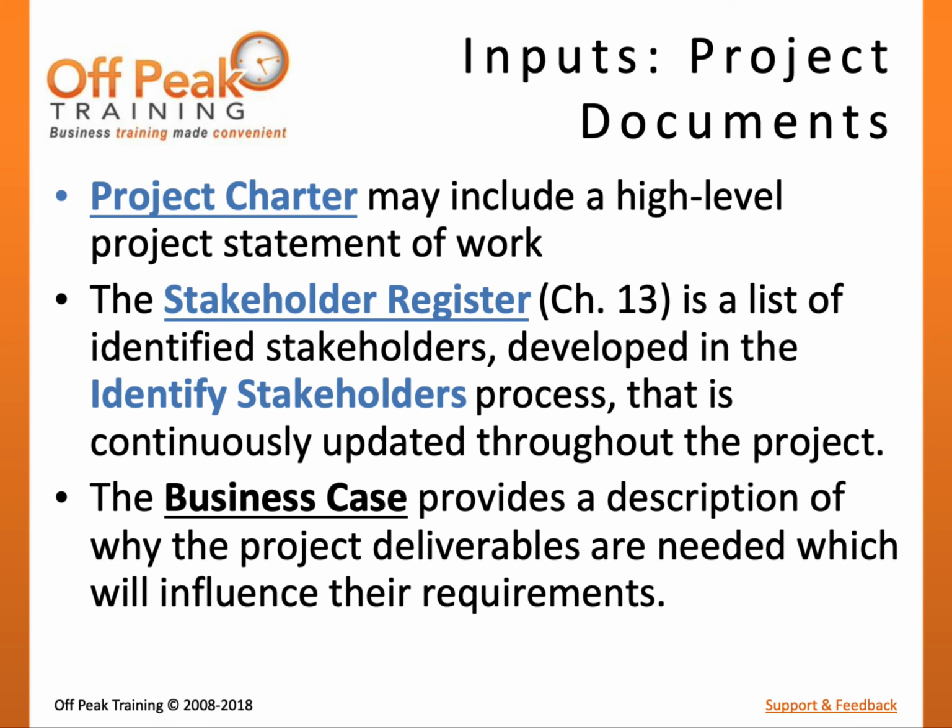The PMBOK guide also lists 3 project documents as inputs to the Collect Requirements process. The project charter may provide high-level requirements and desired product characteristics as determined during project initiation. The Stakeholder Register is a list of identified stakeholders, an output of the Identify Stakeholders process, providing insight as to which stakeholders will contribute product and project requirements. The business case provides a description of why the project deliverables are needed, which will influence their requirements.